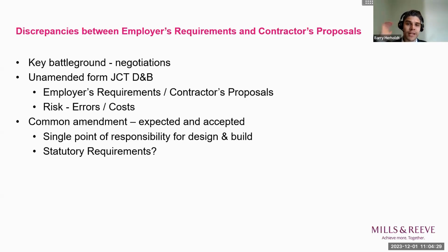The contractor will then deal with this by limiting the position relating to a change in statutory requirements as it is before or at the base date, meaning the contractor takes only responsibility for changes in statutory requirements if the change happens before or at the base date. After the base date, the risk transfers to the employer to some extent.